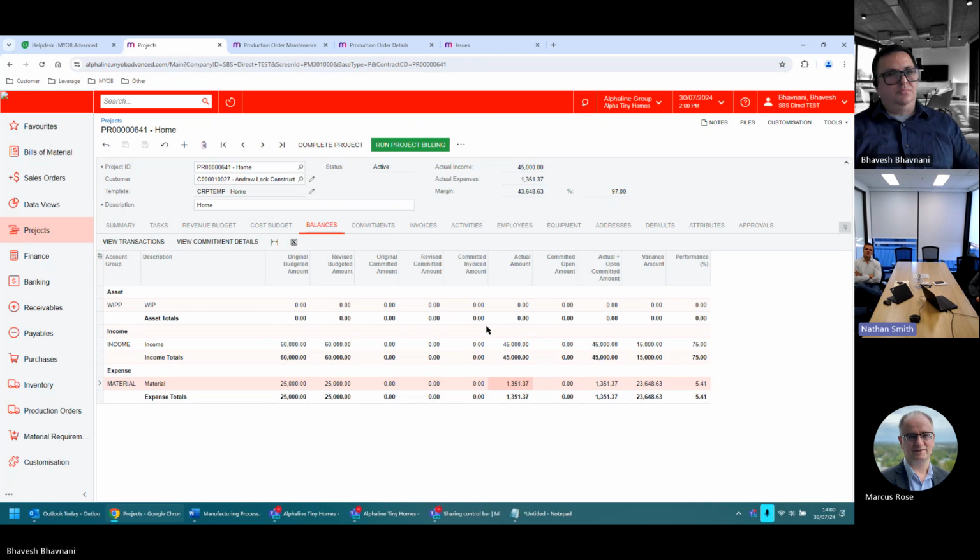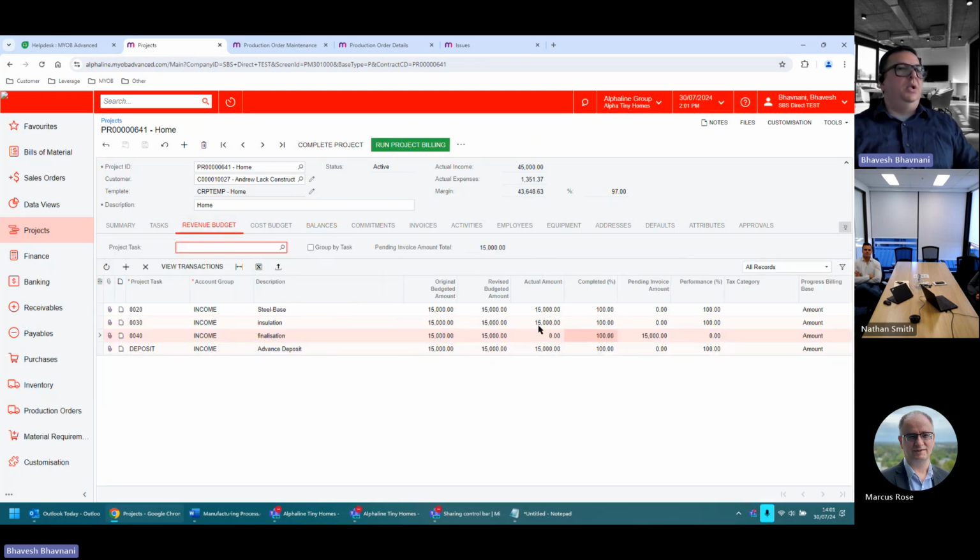Just for now, some background information on this. At the moment, how we do this on a monthly basis: we obviously report on all income and expenses as per invoice date. And the WIP calculation is either added or subtracted from the revenue, depending on what the WIP calculation says. Did we build more than we invoiced, or did we build less than we invoiced? So in this case, the WIP valuation will always be ready for the accountant, so then they can decide what they want to build here.